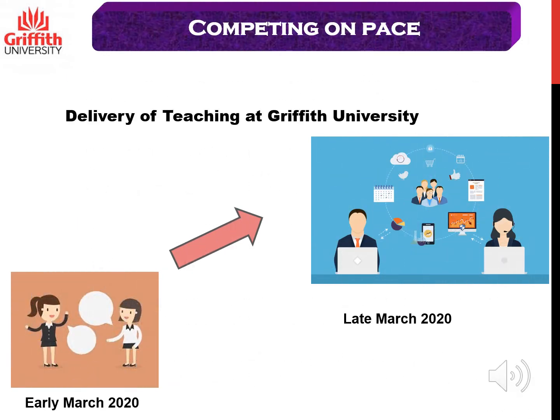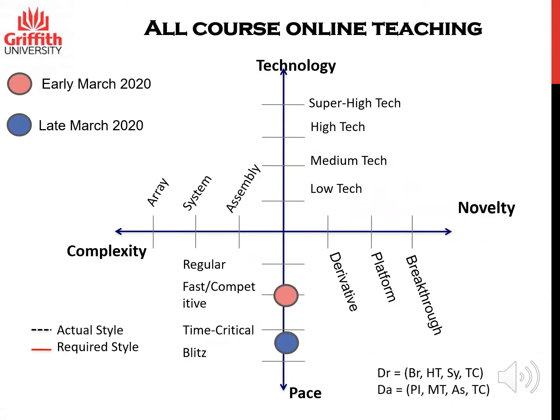The importance of pace in project management can be illustrated using the case of the delivery of teaching at Griffith University in the context of the COVID-19 crisis. Before early March 2020, courses were being delivered in the normal way — some courses online and other courses face-to-face on campus. However, due to the COVID-19 crisis, the university decided that by late March 2020, all courses needed to be migrated to an online basis. This means that organizing course delivery at Griffith University moved from being a fast and competitive project to being a time-critical project.